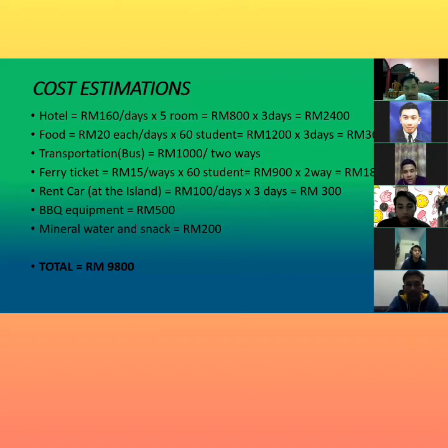For transportation, we use the bus, that costs RM1,000 for 2 ways. For ferry ticket, RM15 per way multiplied by 60 students equals RM900, and for 2 ways which costs RM1,800. For rent car at the island, RM100 per day by 3 days equals 300. For barbecue equipment, that costs RM500, and the last, for mineral water and snack, that costs RM200.